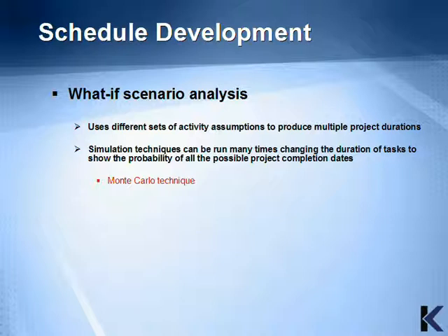Remember, this method of estimating uses a computer to simulate the outcome of a project, making use of the 3-point estimates for each activity. And remember, the 3-point estimates are pessimistic, most likely, and optimistic. The simulation will give you probabilities on project completion, project costs, and the overall project risk.